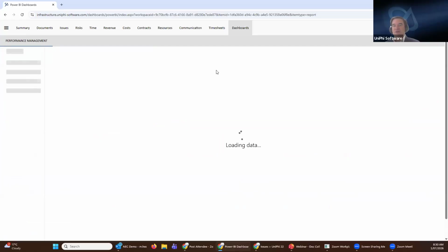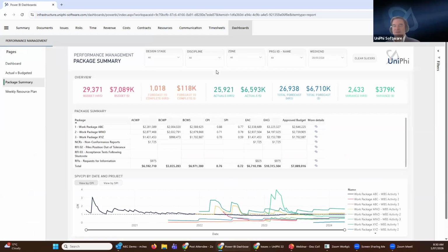So changing those elements dynamically updates all three elements of time, cost, and schedule. If you add more activities in, you're increasing cost. If you baseline that, you're rebaselining against that schedule. If you don't, then there'll always be an actual cost of work performed at the project level that's higher, possibly, unless you're reducing elsewhere, but you'll be able to see that at the work package scope level to see where those changes are taking place. And that's all being then integrated into this view.